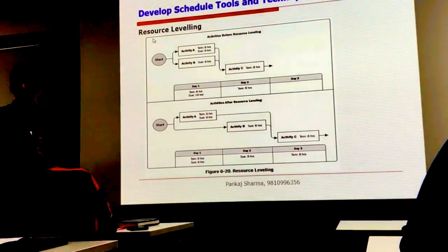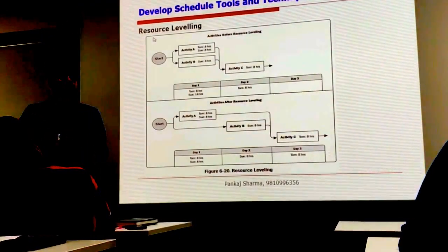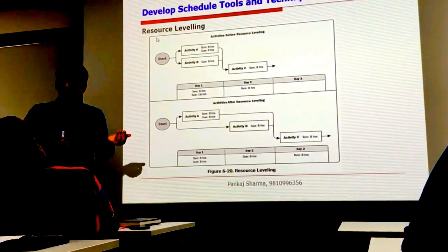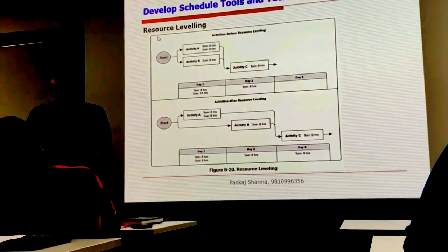Is this clear? So it depends on the situation. If I am resource constrained, I will be using leveling. If I am time constrained, I will be using smoothing.